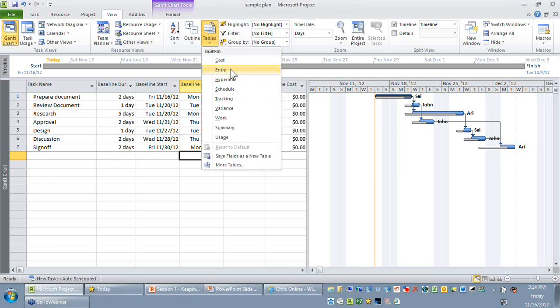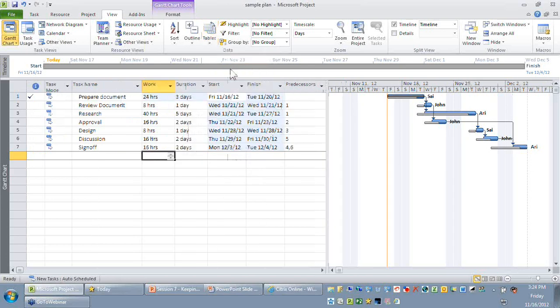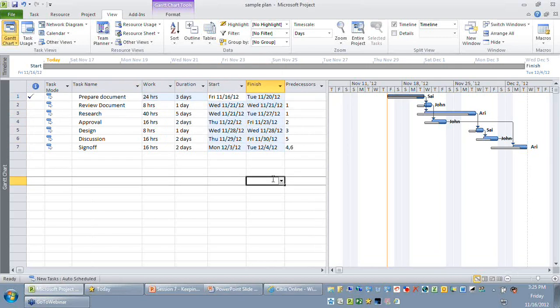So now you can see on your entry table, because the first activity got completed, its duration got revised to 3 days, and the finish date got revised. Because of the finish date, the other activity is also getting impacted. So as you can see, based on your actuals, your entry table is always going to get adjusted accordingly. And this is the power of your entry table. The entry table will not be static like your baseline. Now let's take the first scenario.